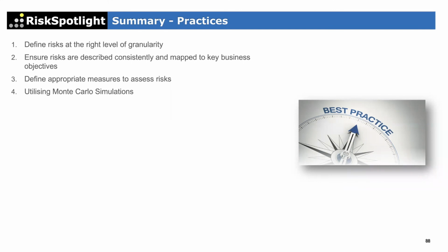Then we talked about using Monte Carlo simulations, but use that from a first line perspective. We don't want our first line people to suddenly start doing capital modeling and economic capital and all that. We just want to use Monte Carlo to validate the subjective assessments we have done, to see how close Monte Carlo says we are, and to challenge the quality of the risk assessment outcomes.